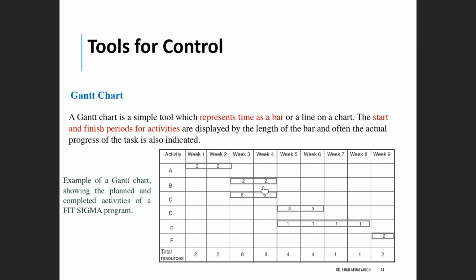This tool can work together with the activity network diagram to evaluate the critical path in your project. And here you can see the overall view of the tasks. Here there is an optional feature: sometimes they add resources for each task and sum up those resources vertically to calculate the total resources needed for that week. In some projects it applies. For example, you need 2 people to work on this task, and you have 6 people who need to work on activity B. So on that week you have to consider 8 people,